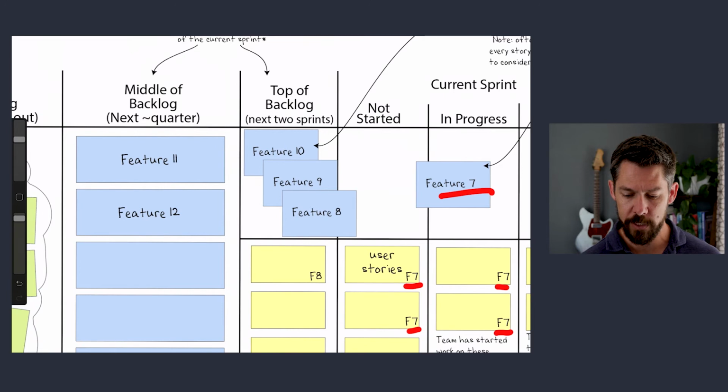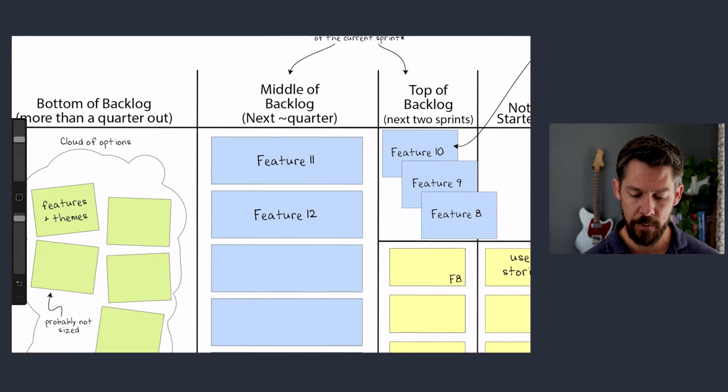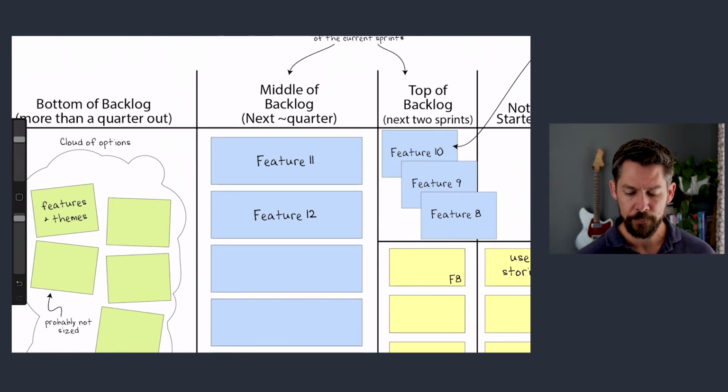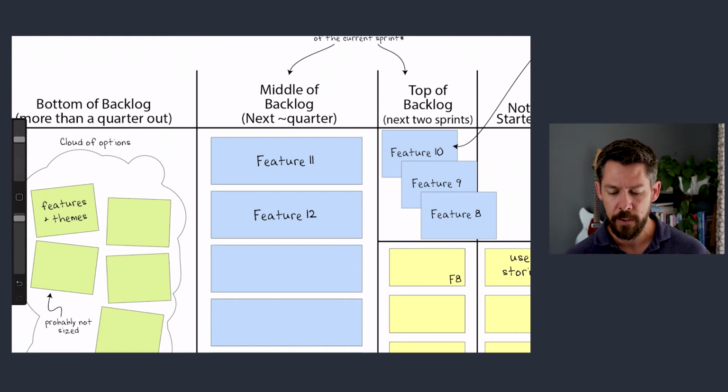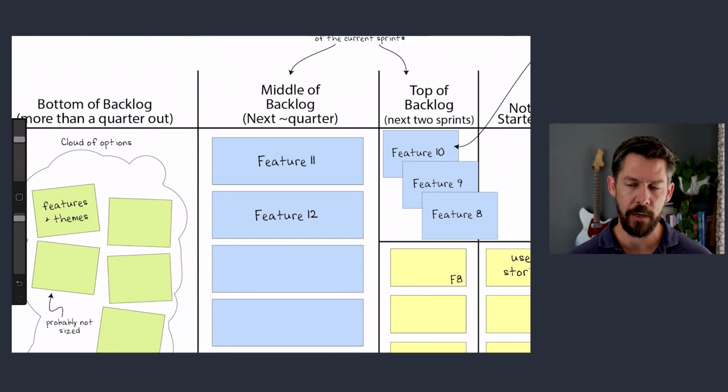Top of the backlog, once you finish refining that, again, only 2 sprints out, you're ready to move to the next column, middle of the backlog. This column has some fleshing out details and features, but not too much. Sometimes there's new user experience flows. That's probably happening here. You might be doing some customer research to understand these things more. These move fairly slowly because they're bigger and more vague, and that's appropriate.